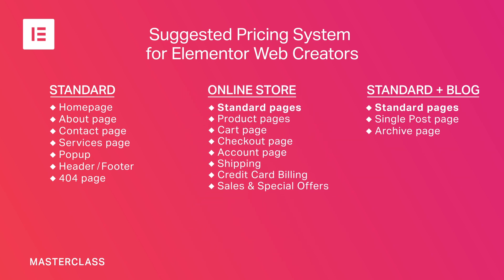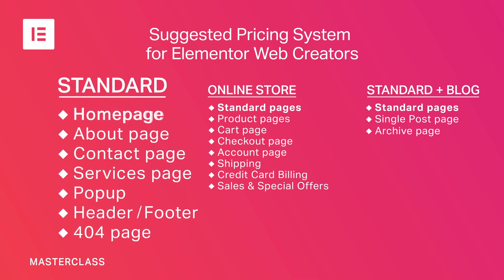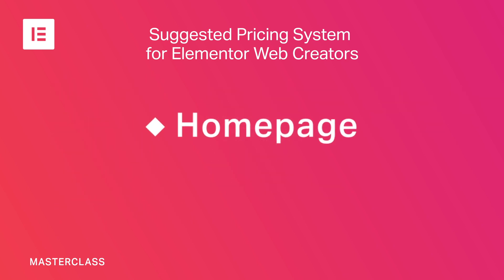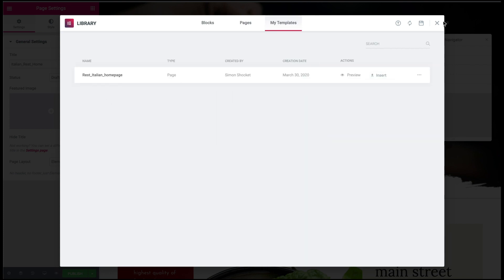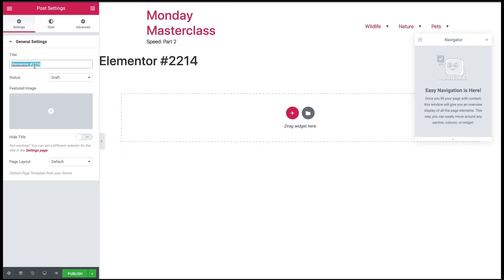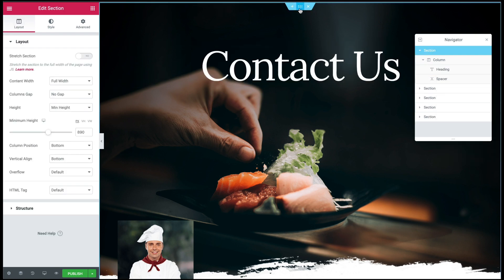Each type of site contains the basics of a standard site, and the most basic page is the homepage. In terms of design and layout, the homepage is where we'll spend the most time — it's the foundation, and all other pages will relate to it. Elementor users make this process easier by first building the homepage, getting it approved by the client, then saving it as a template to construct the rest of the pages, maintaining consistency and saving time. Therefore, the key to a correct pricing system stems from evaluating how long it will take to design and build a homepage, and the pricing should be modular, just as the Elementor workflow is modular.